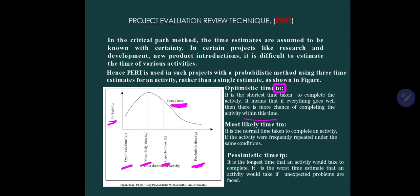Most likely time is represented by TM. It is the normal time taken to complete an activity if activities were frequently repeated under the same condition.